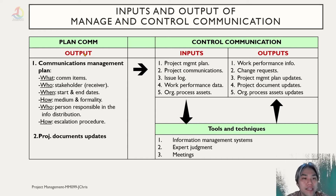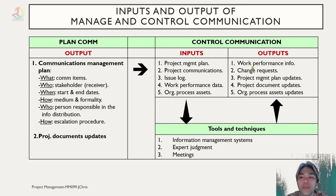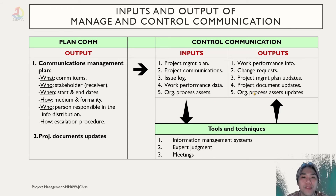Control communication similarly uses the planned communication output as its input, and applies tools and techniques such as information management systems, expert judgment, and meetings. The outputs are work performance information, change requests, project management plan updates, project document updates, and organizational process assets updates.